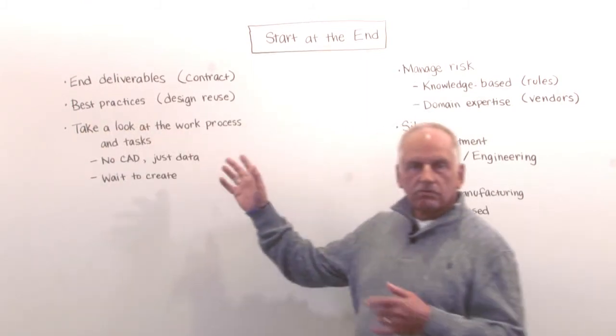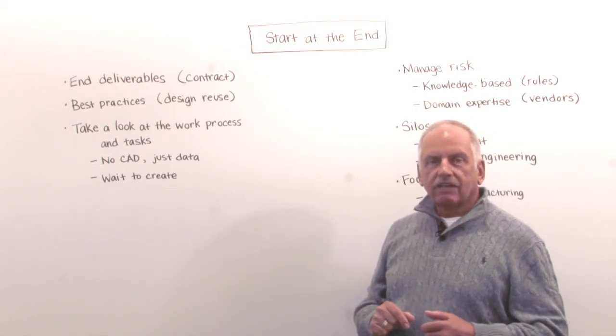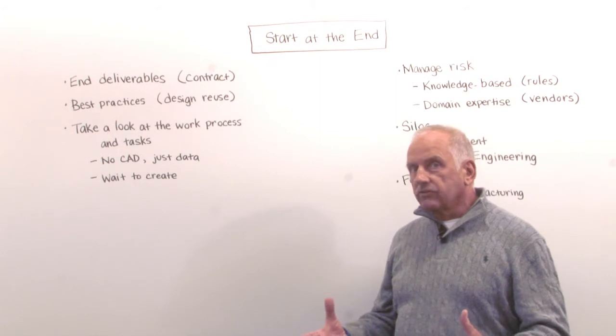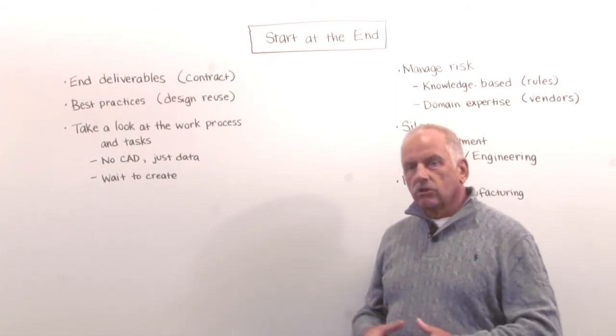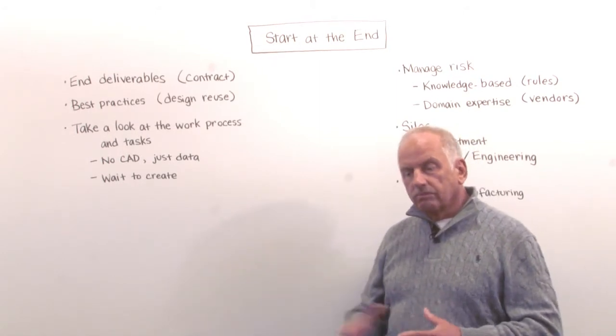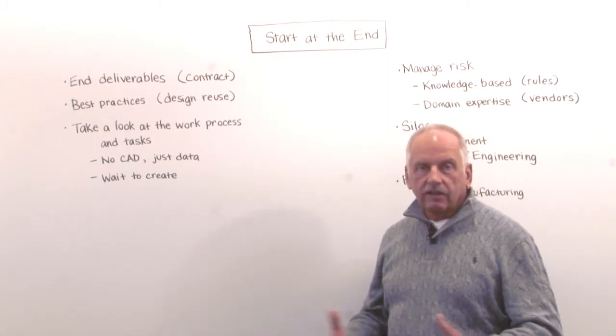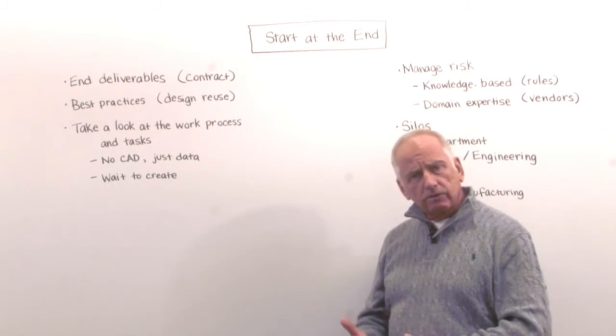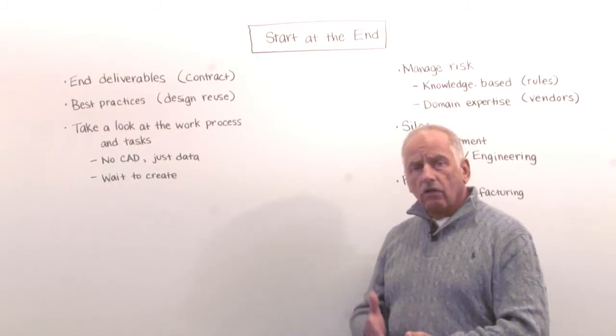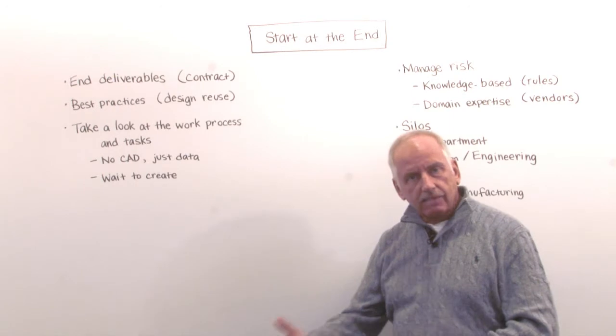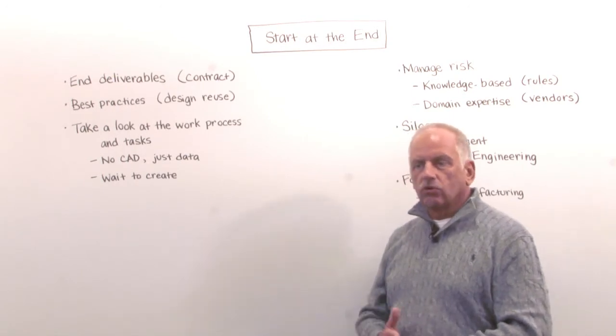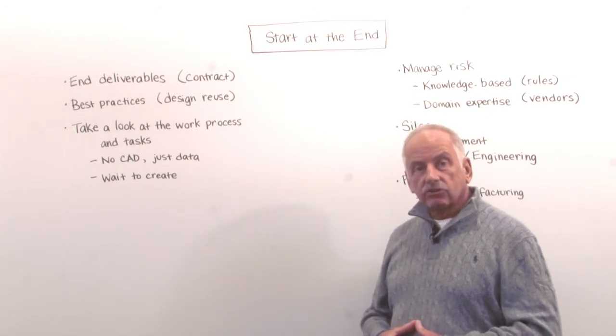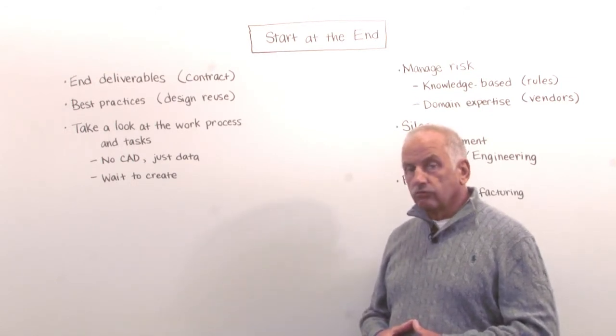Some of the things I wrote down: first of all you have to look at the end deliverables. That sounds obvious and maybe you don't know all of them, but certainly in certain contracts or based on previous designs and experience you know what kind of deliverables you need to create on projects. If you know that, then you can already start to create some content for symbol libraries or pipe specs or make sure that you have your content ready to support these deliverables that you have to create for your project.